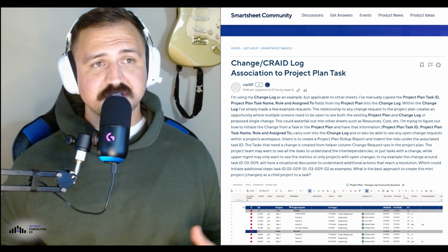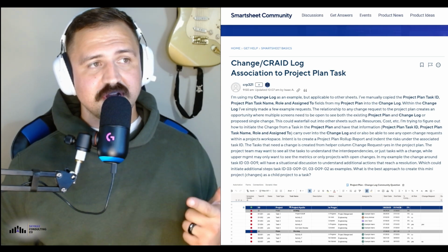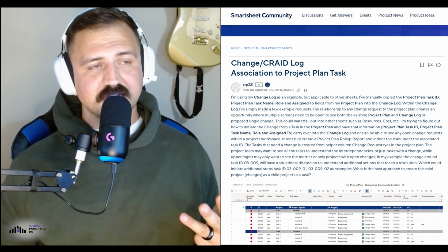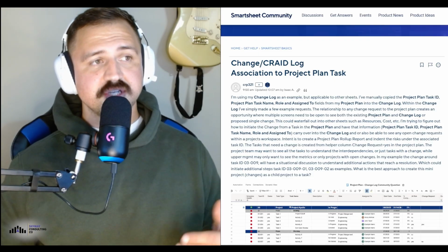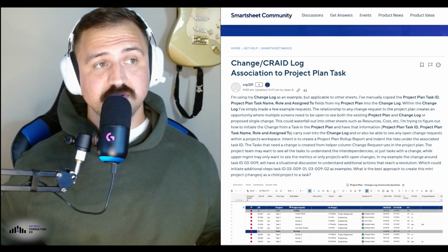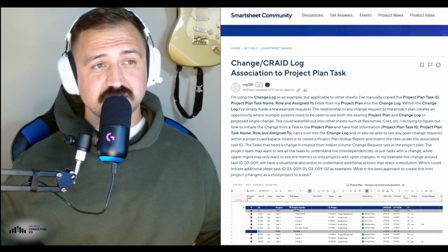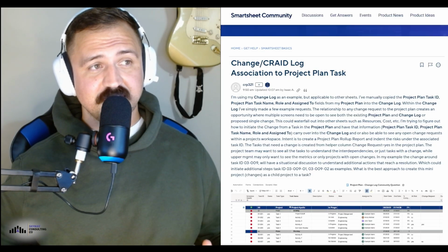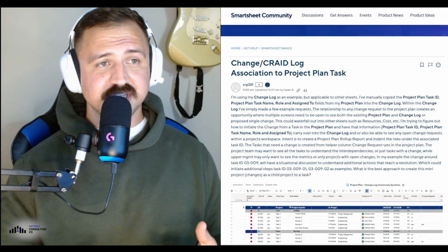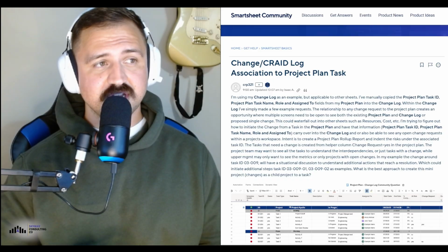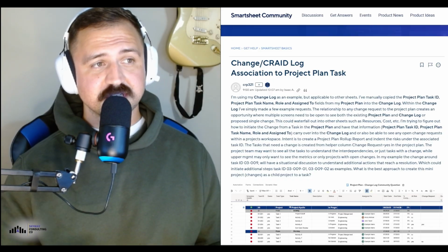"I'm using changelog as an example, but applicable to other sheets. I've manually copied the project plan task ID, project plan task name, role, and assigned to fields from my project plan into the changelog. Within the changelog, I've simply made a few example requests. The relationship of any change request to the project plan creates an opportunity where multiple screens need to be open to see both the existing project plan and changelog or propose a single change.